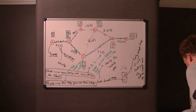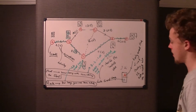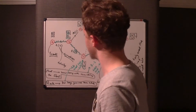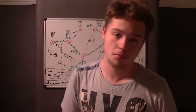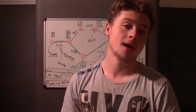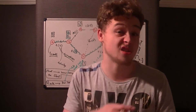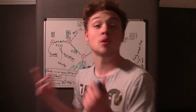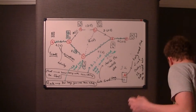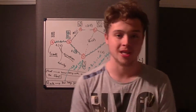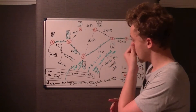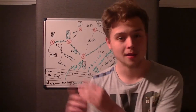By the way: calculating the Early Event Time is called the forward pass because you're moving forward through the diagram. Calculating the Late Event Time is called the backward pass. You don't really need to know those terms but they might be referred to in the exam.